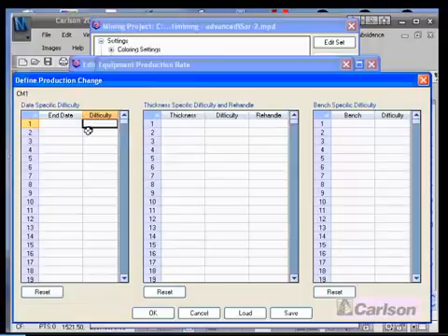The difficulty factors and the things that throttle productivity for coal mines typically fall into a couple of groups. One is date related, time related. The other is positionally related, such as areas where there's difficult mining conditions, bad roof, water, whatever.